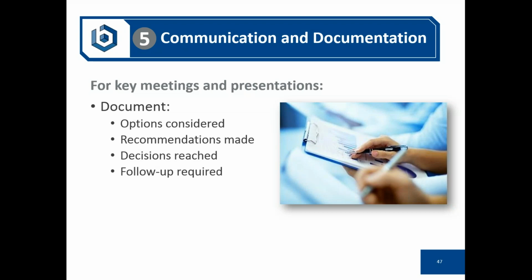and is going to challenge you for any type of human comfort going forward. So when you have these decisions, if you've got it documented that your client makes the unfortunate decision of going with option B or option C, and then a year later they start complaining that people in their office are uncomfortable at the change of seasons, you can bring out your meeting minutes and say, well, we recommended option A, but you chose option C, and you saved some money that way, but these are the thermal comfort issues that we explained might be there.